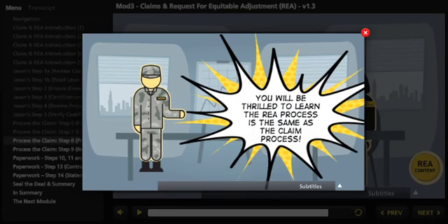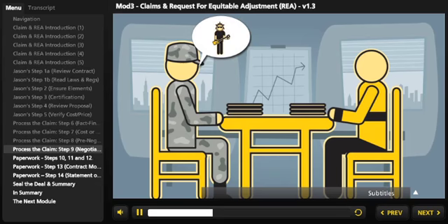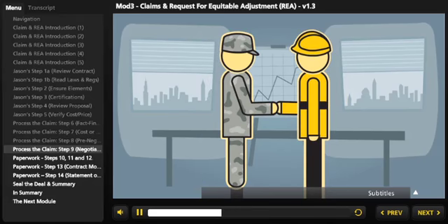And yes, folks, once again, you will be thrilled to learn that the REA process is exactly the same as the claim process. Next, Jason and Charlie conduct negotiations. Jason holds a negotiation meeting with Charlie and spends time explaining why he's not willing or able to reimburse some of Charlie's expenses, such as his cousin Ramon's private jet ride from Italy. Charlie accepts the government's position and agrees that $9,600 will resolve the dispute.